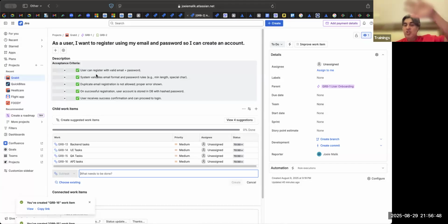It is not an independent story. You cannot test the registration form without the corresponding backend. And you cannot show the story to the stakeholders either, because what are you going to show, a form? If you click on it, nothing happens. That's broken functionality. You got it, right? Creating only a registration form by a developer is not a good story, but creating user registration functionality is a user story.